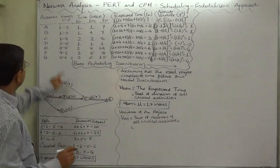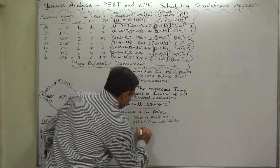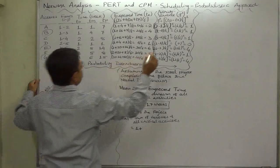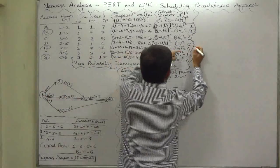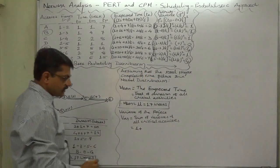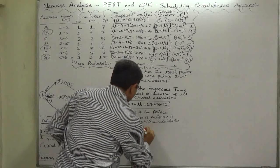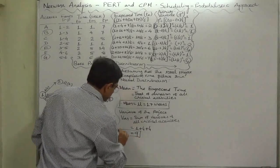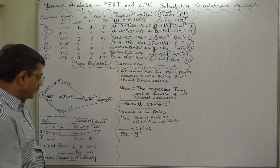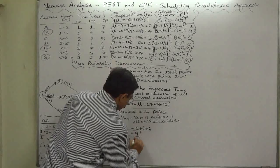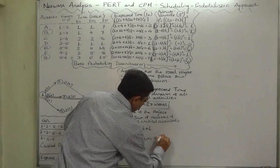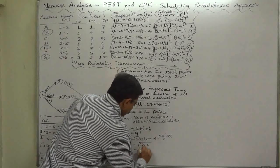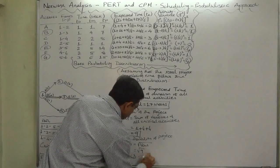B, E, and G are the critical activities. The variance of B is 1, variance of E comes to 4, and variance of G also comes to 4. So the variance of the whole project completion time comes to 9. Now we can calculate the standard deviation, which equals the square root of the variance — that is, the square root of 9 — so the standard deviation comes to 3 weeks.